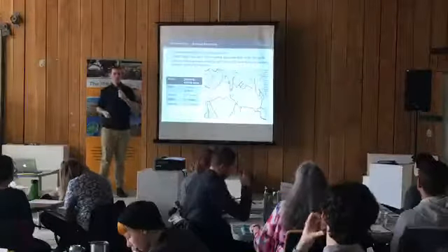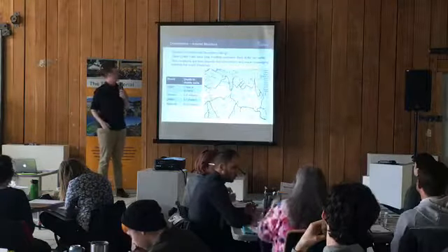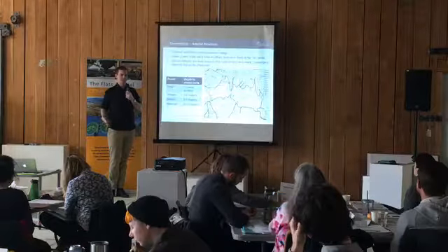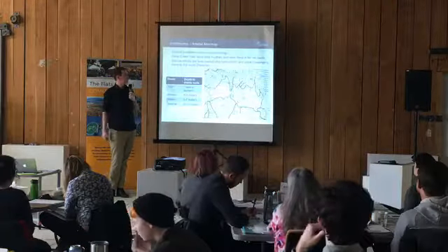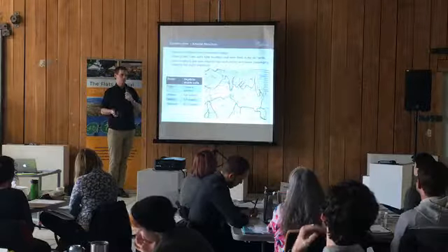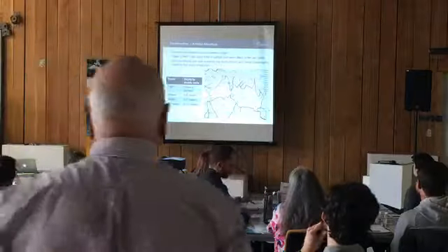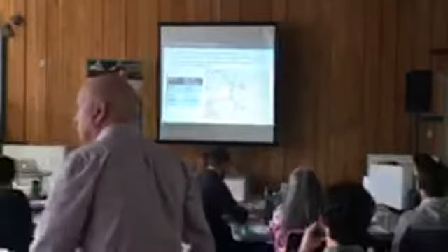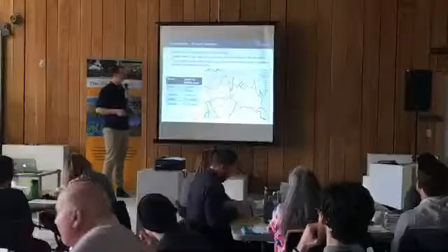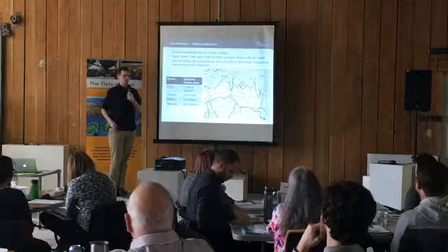Another key consideration for constructability is ground conditions and what that means for foundation design. As you may know, False Creek Flats used to be a tidal mud flat that has been filled in, and what that means is there's a lot of marine deposit and fill at the top layers of soil, and that creates some challenging ground conditions where you need to go down quite far in some cases before you hit some more stable soils.